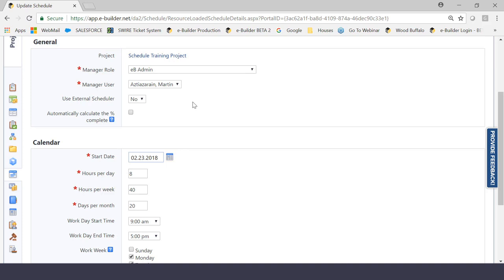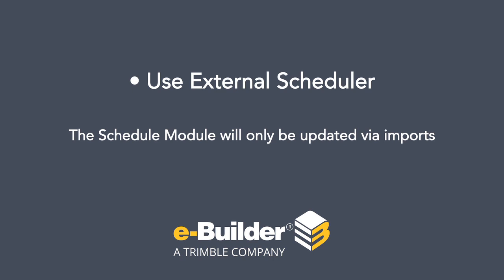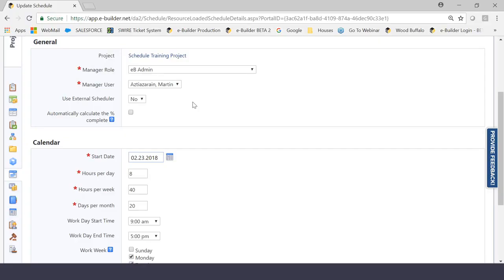As you probably already know, eBuilder allows you to do a lot of imports into many different modules, including the schedule module. Now, what does this mean? What this means is that if, let's say, there is a client out there or someone using the schedule module that says, we just want to record information in eBuilder in the schedule module, but we will be doing our daily maintenance or our weekly maintenance in another software. Let's just hypothetically say, Microsoft Project. So if that was the case and you click yes here, what in essence you're saying is that the schedule module will only be updated via imports as opposed to you manually doing the updating within the schedule module itself.